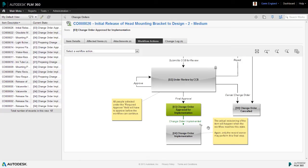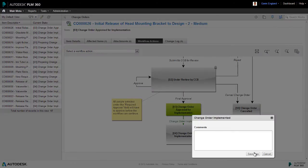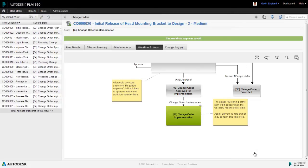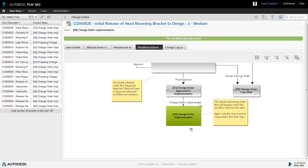When we pass through this state in a revisioning items workflow, the revision controlled item gets pushed to the selected stage of its lifecycle. So, it's only at this point that a new revision of the bracket will be created.